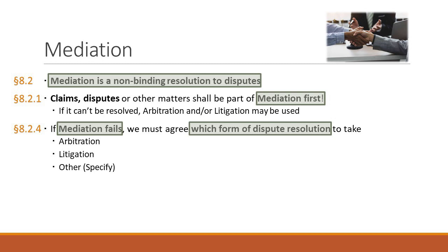So I almost always, when I fill out my contracts in construction, with the mediation being mandatory, click on litigation. Now there may be times when you represent an owner where they don't want their information to be in a court of law. Private owners may want arbitration. Or there may be an area in a jurisdiction where they think arbitration will be more beneficial to them. Maybe the public sentiment against them seeing their name in the paper in litigation is not in their favor. So there are some circumstances where I talk with my client and we will go arbitration, but most of the time I'm going to go mediation followed by litigation.